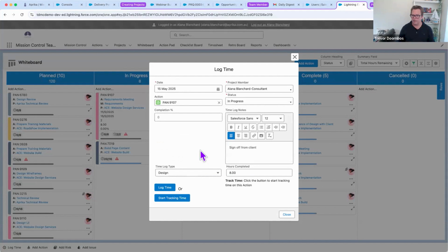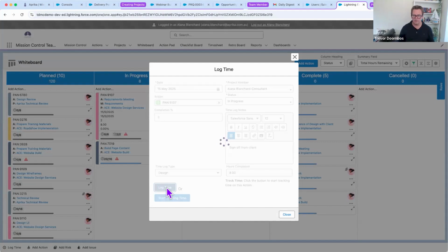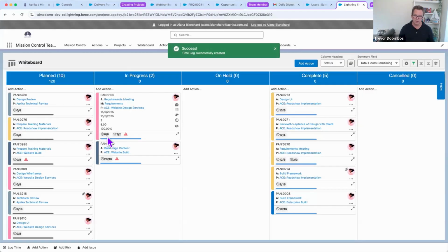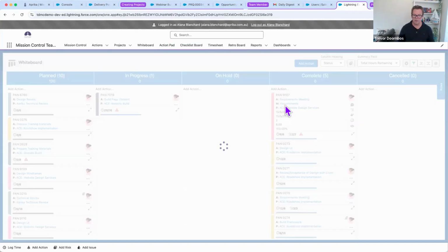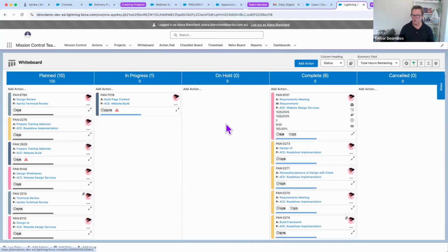So from that perspective, Alana can actually mark this off as complete here. We'll just log the time for now and see what happens from an update perspective. And once that time log's been updated against the project action, we'll see 8 out of the 8 hours are done. The progress bar is complete. The 2 checklist items are completed. So Alana can simply just drag that to complete and move on to the next item she's working on.